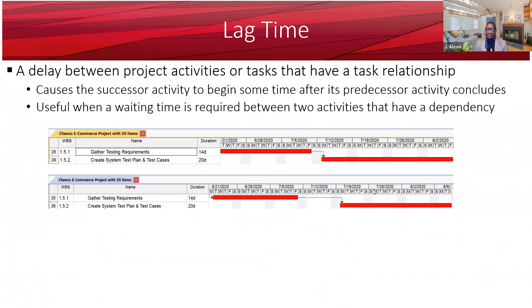Lag time, on the other hand, is a delay between project activities or tasks that have a relationship. A lag time will cause the successor activity to begin sometime after its predecessor activity concludes. It is useful when a waiting time is required between two activities that have a dependency.